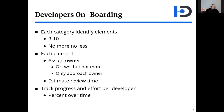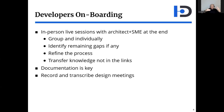After the onboarding — which is mostly self-study — if they have a question, they go to the owner, but it's not the owner's job to teach them. After the onboarding, you engage in in-person live sessions with the architect and the subject matter expert. The architect deals with framework design, detailed design, and process. The subject matter expert deals with domain issues — and remember, the most important thing for them to learn is the domain. You do both group sessions and individual ones. The purpose is to identify remaining gaps, but also to send a message: you will be tested on this by a certain date. If something is missing across all of them, it's not their fault — it's yours. You have to refine the process and add more material.